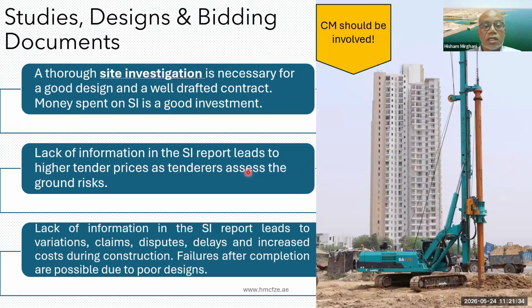Another practical tip during the site investigations is that the contract manager really needs to be involved in the decision-making process regarding the scope of the site investigation. Normally, from the employer's perspective, there is a huge pressure to economize on the site investigation. And of course, we all know that this is counterproductive.